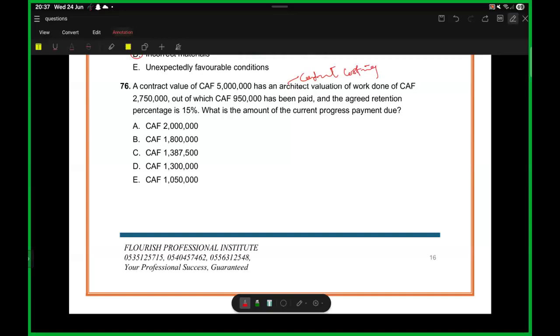So in contract costing, mostly the work is over a longer period of time, and so you are unable to complete the work within the period. But in management accounting or cost accounting, we want to record transactions within the accounting period. So we mostly compute what we call the total contract price for the period. If it is for 5 years, determine the total contract price. Then you determine the percentage of completion.